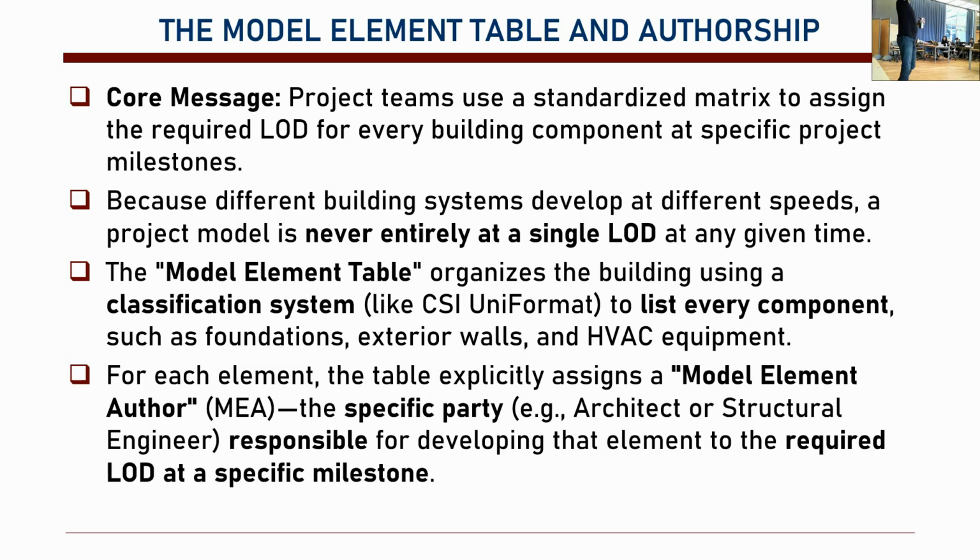Who is responsible for the windows? This is the author for the model elements, and who will give me the LOD 200, LOD 300, LOD 400 windows in the process. So what stage? Okay, so you basically describe that in model element table.